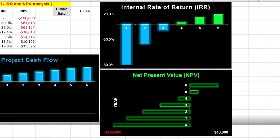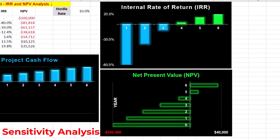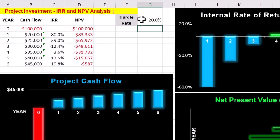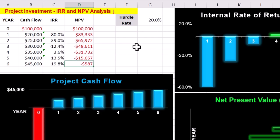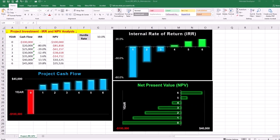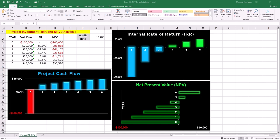NPV assesses how sensitive a project is to changes in the discount rate or cost of capital. For example, if we change the discount rate to 20% in our case, the NPV by year 6 becomes minus $587. The project's NPV turning negative at a higher discount rate shows that its profitability is highly sensitive to the cost of capital. If the actual cost of funding, including interest rates or required return by investors, goes up, the project would no longer create value. If funding sources are volatile or uncertain, this sensitivity highlights a potential risk of project failure.